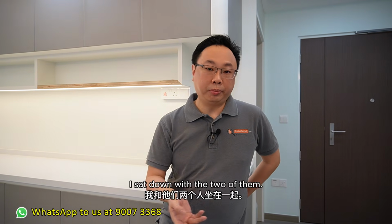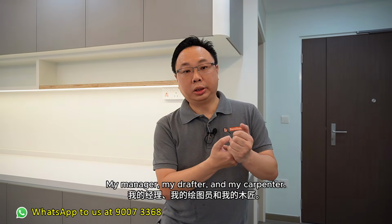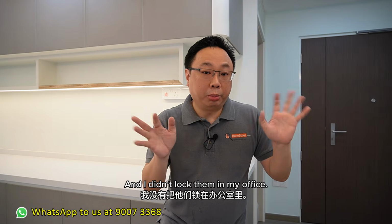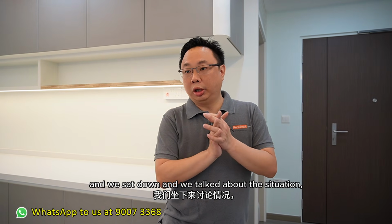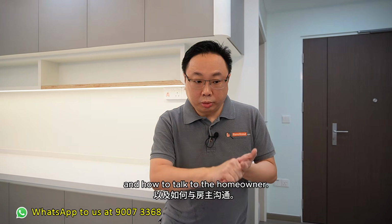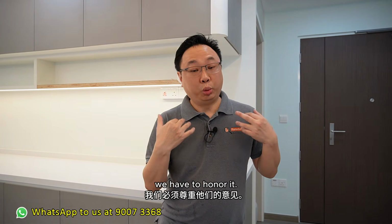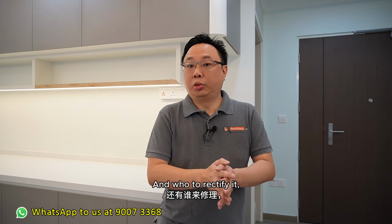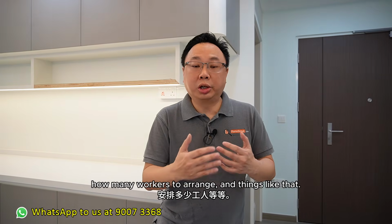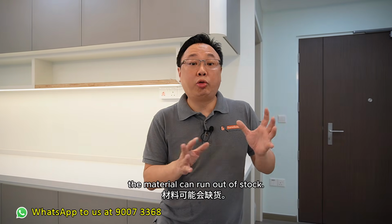I sat down with the two of them, actually three of them, my manager, my drafter, and my carpenter. And then I didn't lock them in my office. It was an open office, and then we sat down and we talked about the situation, how to resolve the situation, how to talk to the homeowner, and then if the homeowner insists on replacing the whole thing, we have to honor it, and who is to rectify it. Okay, how many workers to arrange and things like that. The logistics behind it. And whether the material still has stock, because sometimes after one project the material can run out of stock, then you run out of the colors you want and things like that.